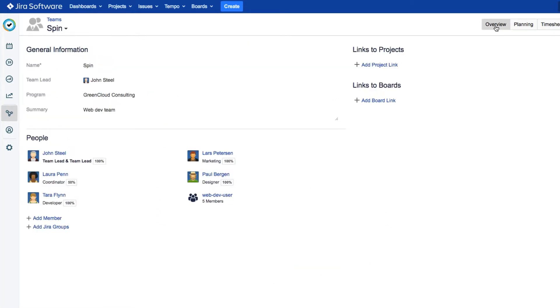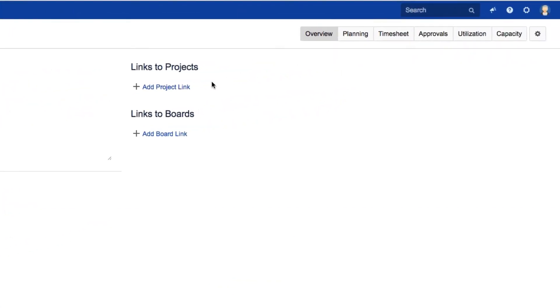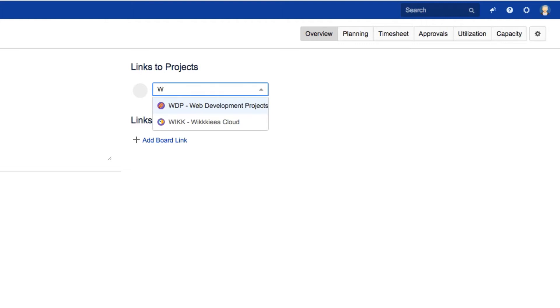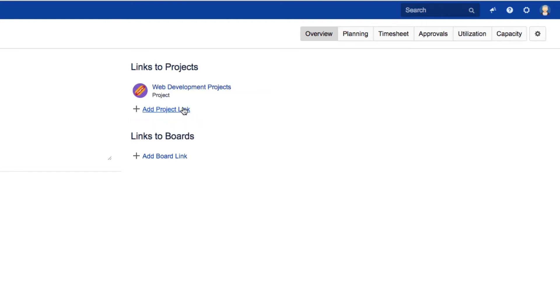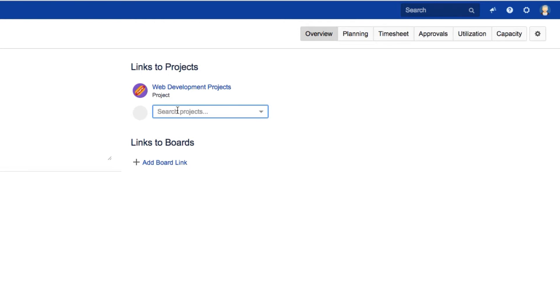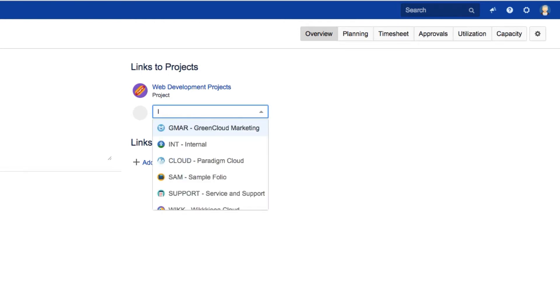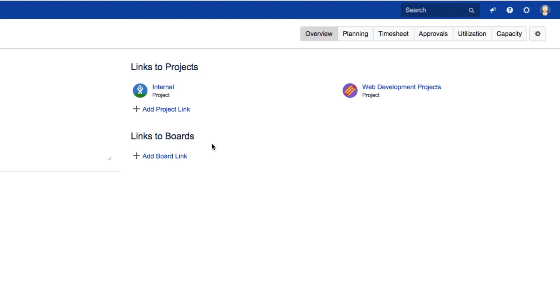Back on the team's overview, click Add Project link at the right and search for the project. We'll select Web Development Projects. To add more projects here, keep clicking this link. We'll add the INT project so that our team can log issues to all the company's standard internal issues, like vacation and sick days.